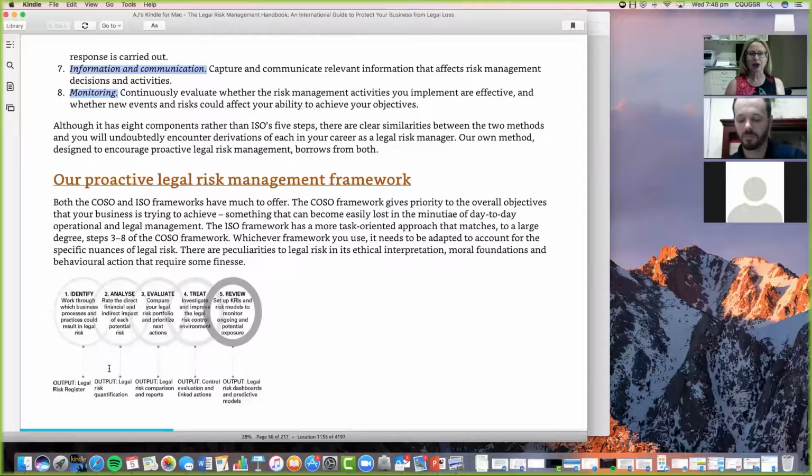And then they say, okay, if it did crystallise, what are the typical kinds of losses that you would sustain if the risk actually occurred? And they're saying, look first at the direct impact. Obviously, that's their hard data. So they want you to put a dollar figure on this thing. If this event crystallised in the ordinary situation, how much is it going to cost you in hard dollars?